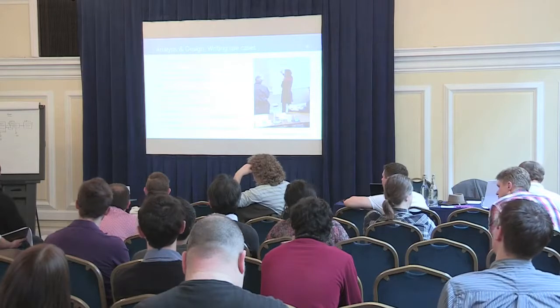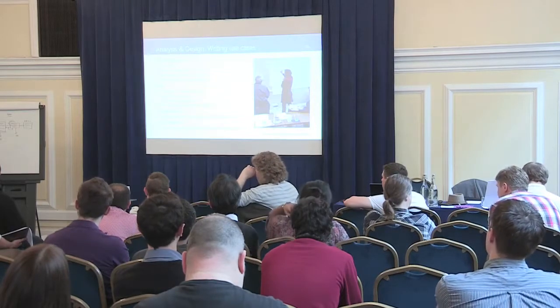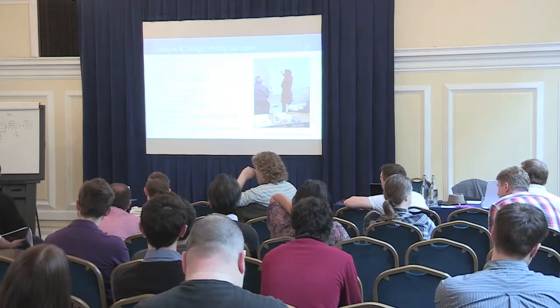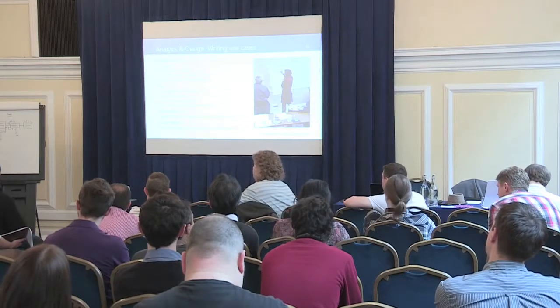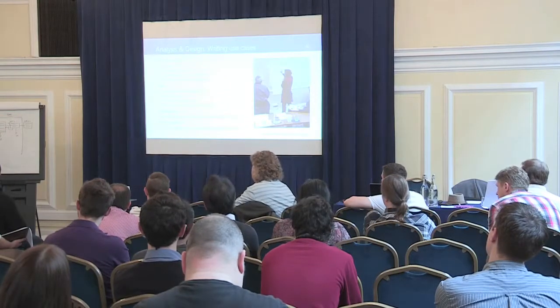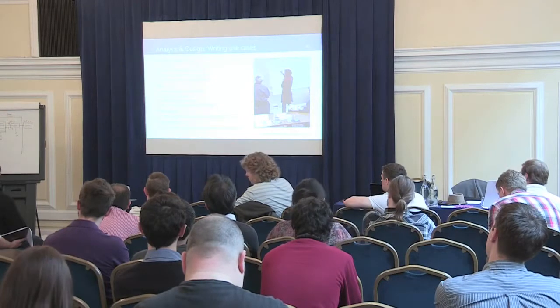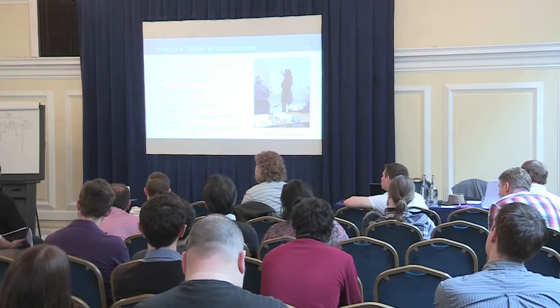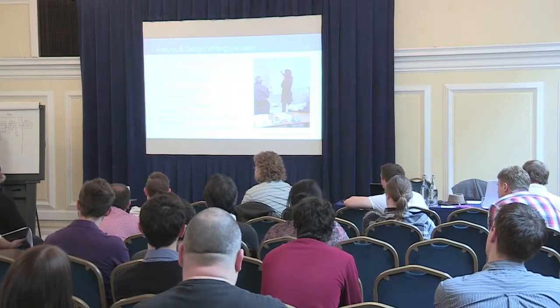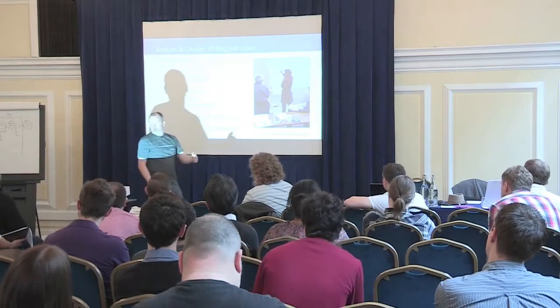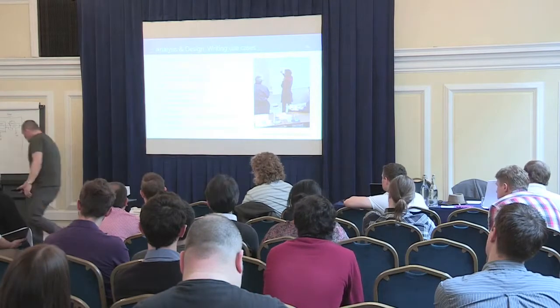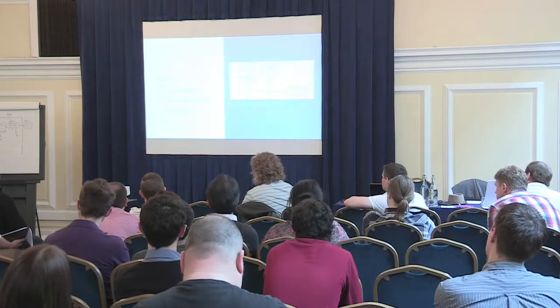But the thing is, if you do this with these smart use cases, which are really, really small, it's actually very limited. So the basic flow is usually like 10 to 20 steps, and there's usually 1 to 5 of these alternative flows. That's basically it. So that's a very good unit to build and to test. And the funny thing is, testers love this too.